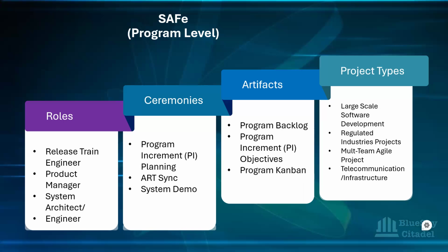And then we also have the program Kanban, we can call it that. It's a visual representation of the flow of the features through the stages of development, e.g., the discovery stage. So the program Kanban is just for visualization, because we're talking about a complex thing. They are working on a large scale, so they need a board to be able to show that, oh, we finished this, this is the discovery stage. These are the things we've discovered. No, this aspect, we don't want to forget it. It helps to keep a record of things, so to say.